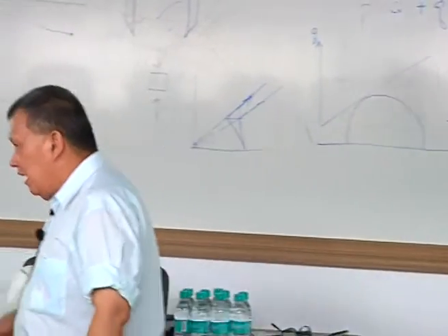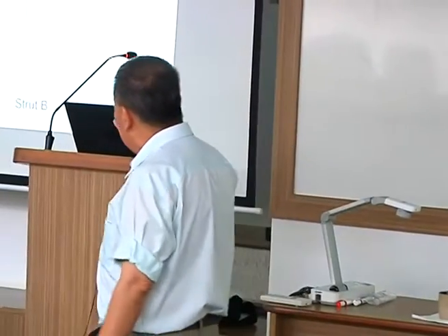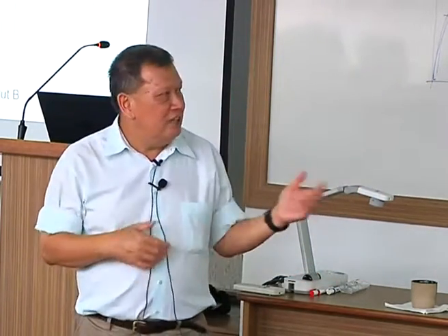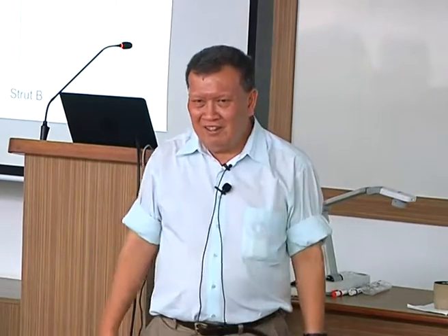And so I told him, look, this is a classic situation of unintended effect from the construction sequence. The guy has never done anything wrong, and to me that construction sequence is perfectly normal. This is the kind of thing they would do. And yet it leads you to something like that. But you won't see it if you're doing 2D, because your 2D vision is, oh no, just the whole layer, just going like that.